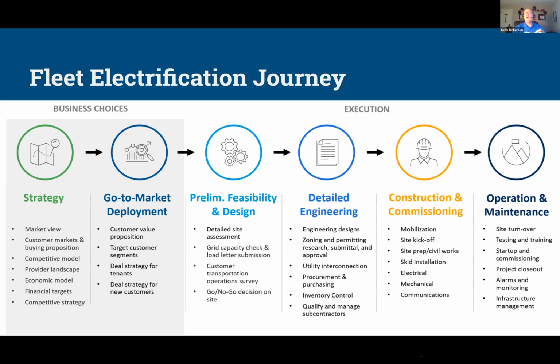Understanding how the permitting works. The utility and the permitting are what we call the long poles in the process, because let's say you need 5 megawatts of power and there's not 5 megawatts of power available there. So the utility is going to have to plan to add that additional capacity.